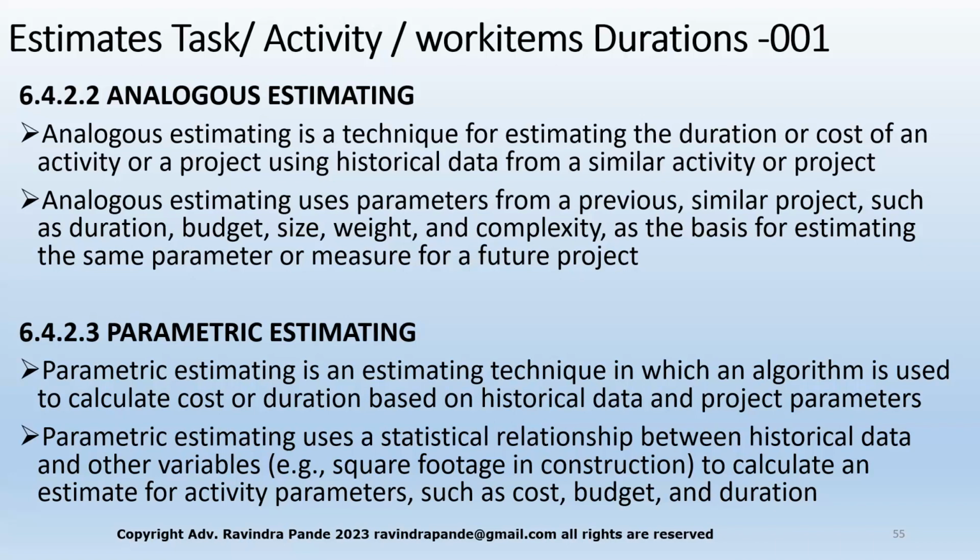If the historical figure says 4 hours and I complete in 3.5 hours, that's okay. But if it says 4 hours and the last-to-last project might have taken 3 hours, then we need to really be concerned about the efficiency decreasing. So that might not be the correct one, and we might need to go with another estimation methodology. But if you have really great historical figures, you might use analogous estimating.